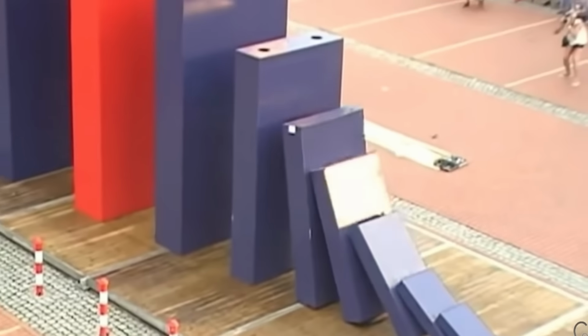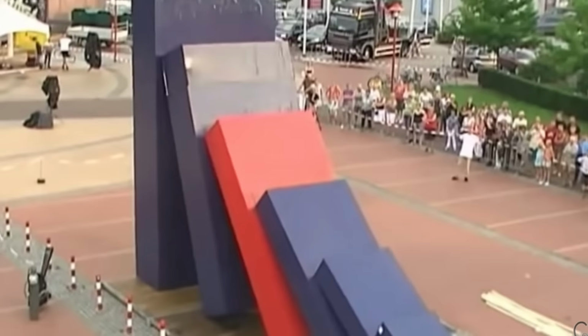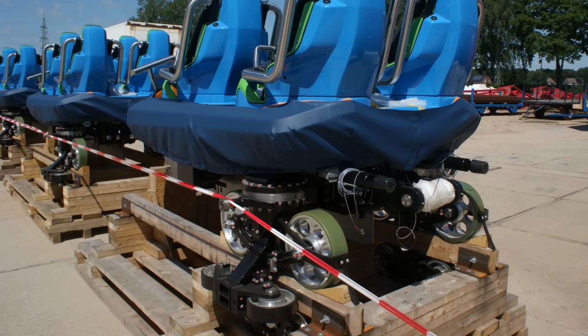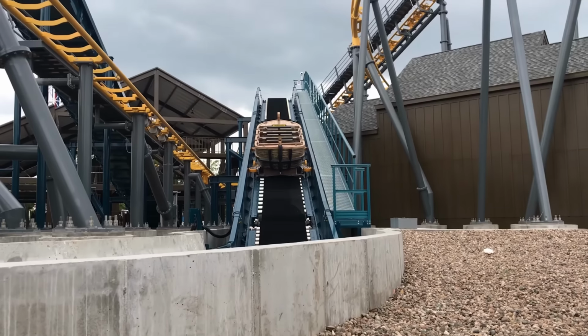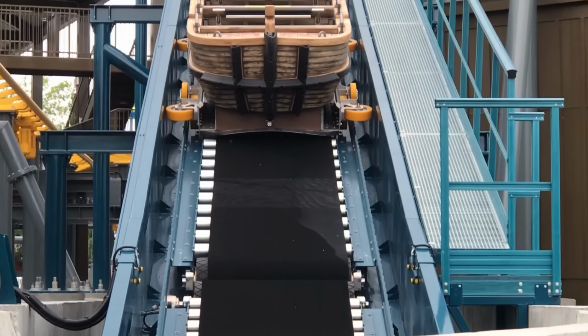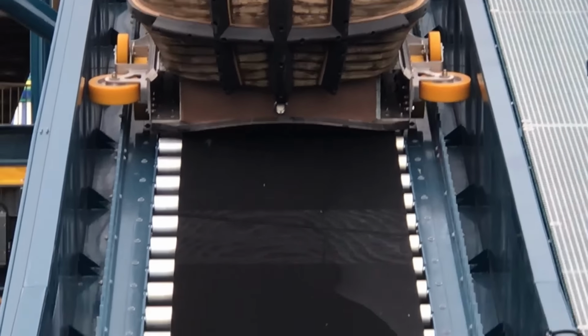So by the end, you might not have a ride open when the park opens because your other stuff just fell behind. When you do the mass takeoff and you take all the rides off at the same time, you can make up that time because when Project A starts falling behind, you just shift your manpower a little bit and you work on Projects B and C and those other ones, and you get them actually running ahead of schedule. That way you can make up the time when that first one starts to come back.